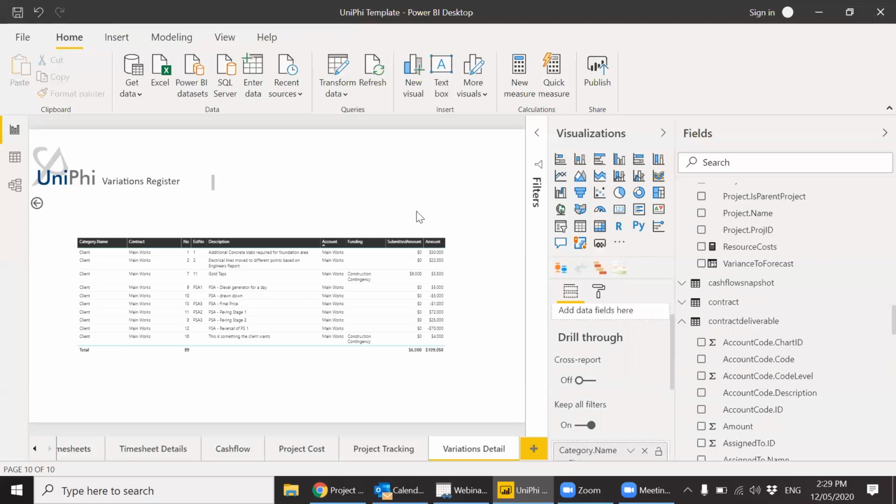You can't get a profit at completion if you're not forecasting. And if that's for a practice, you need to be forecasting hours, and not many people are doing that in the deployments that we have so far. So without forecasting hours, we don't know what the forecast costs are going to be. You can forecast revenue quite quickly, but the costs are a challenge if you don't have resource planning hours.